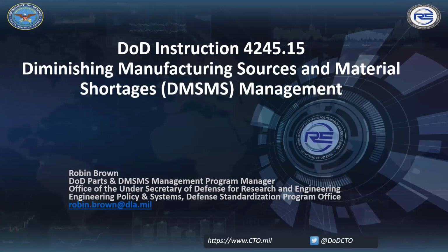DoD spends at least $2.4 billion annually to resolve DMSMS issues, and more than 90% of these costs are associated with out-of-cycle redesigns that average about $2.3 million. DoD is spending way too much money on DMSMS resolutions, especially for redesigns, and not enough on proactive DMSMS management. Proactive DMSMS management reduces redesign costs by about 50%. So proactive DMSMS management has been limited by the lack of incentives, policy, inconsistent application of best practices, and lack of contract requirements. And the lack of clarity in OSD leadership has also made the problem even worse.